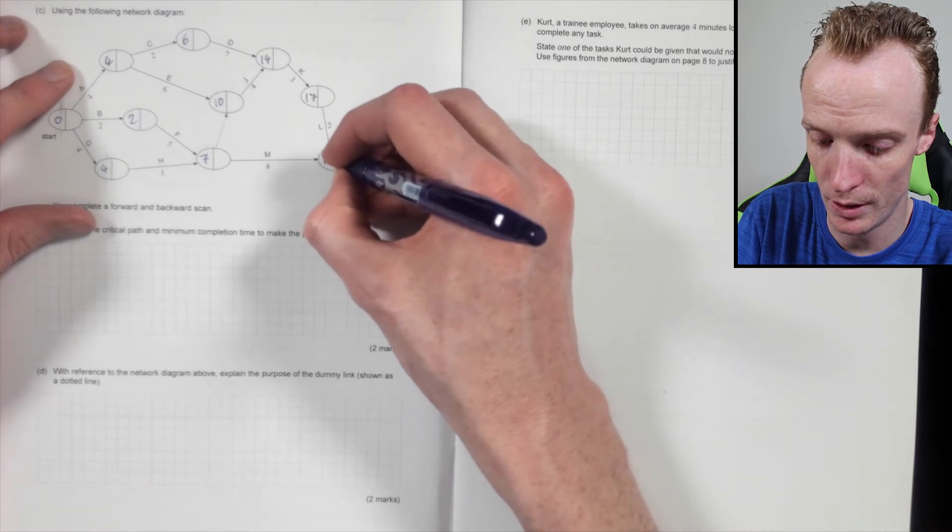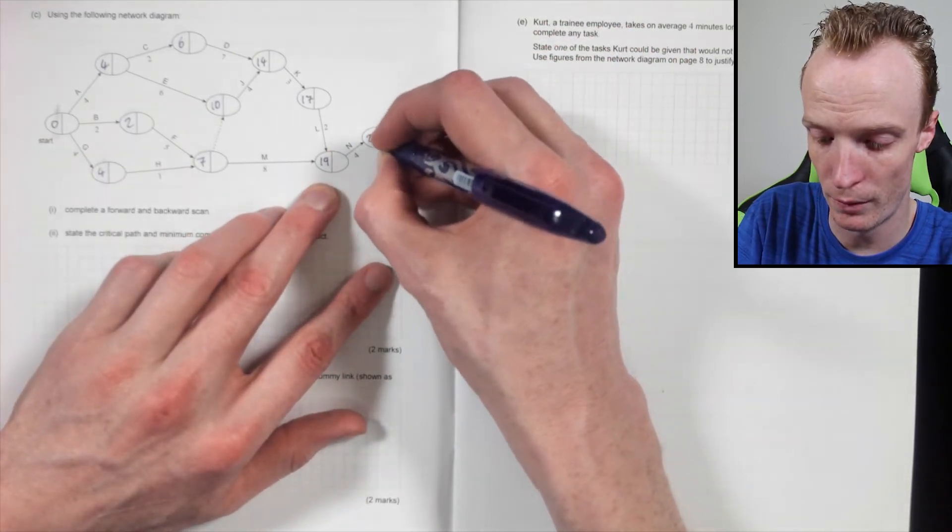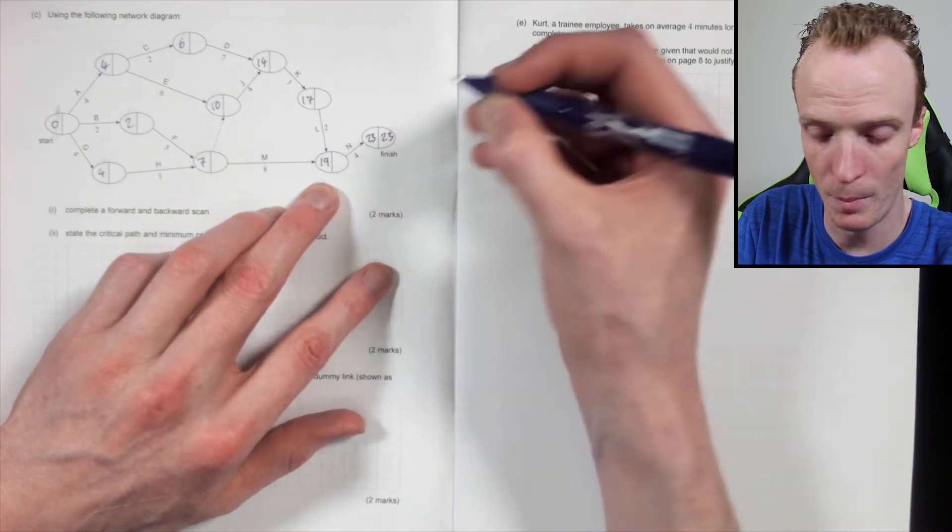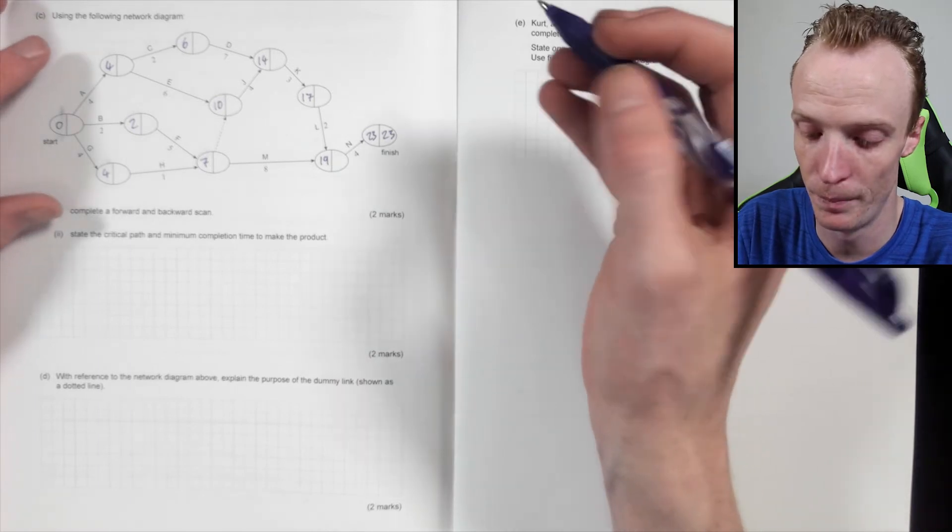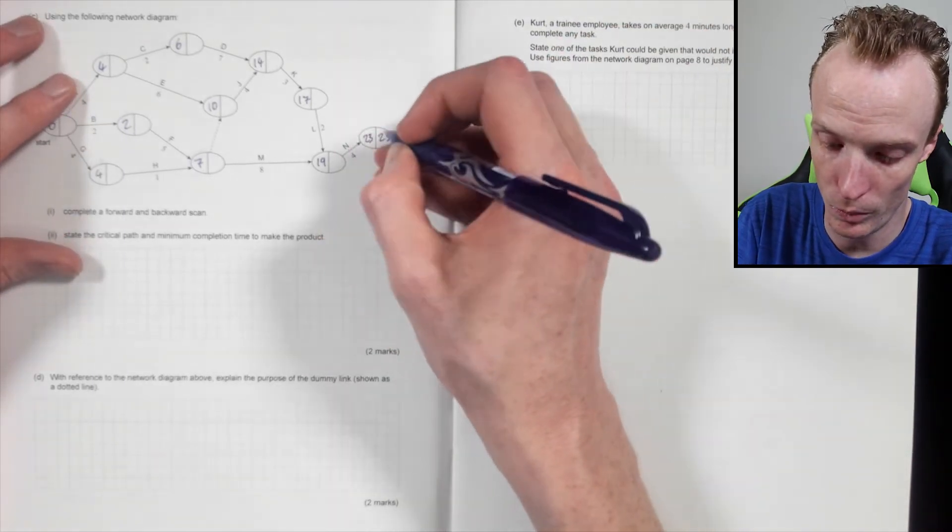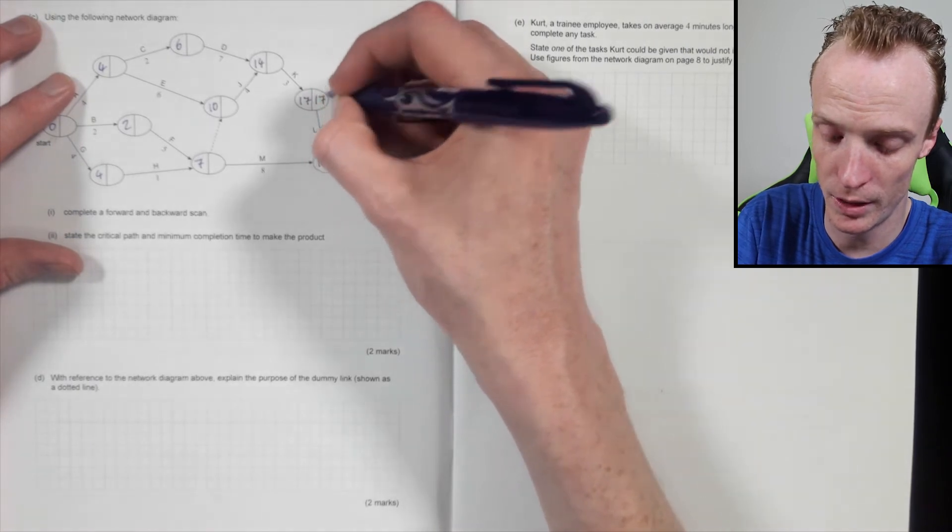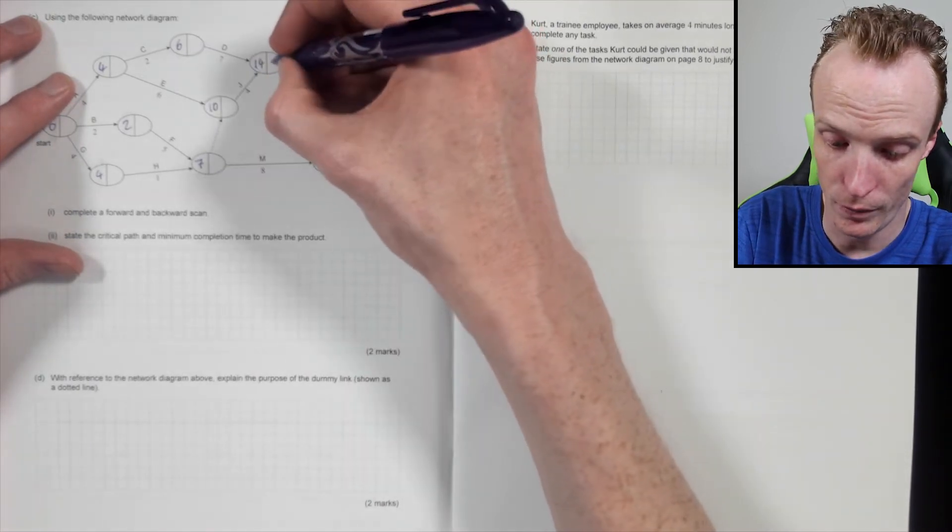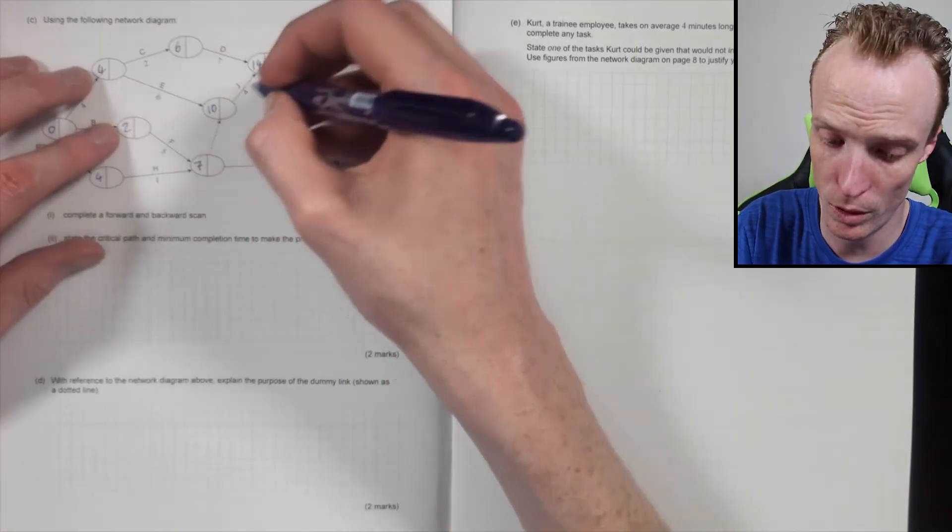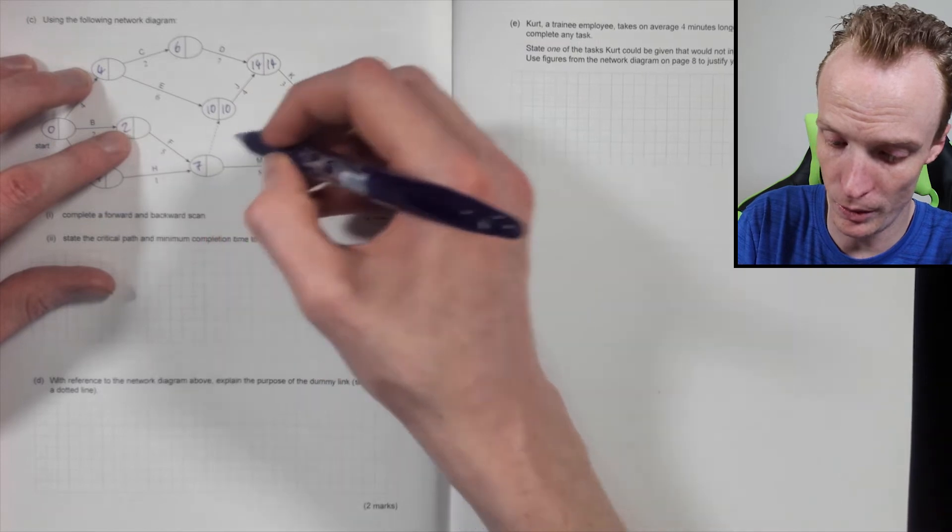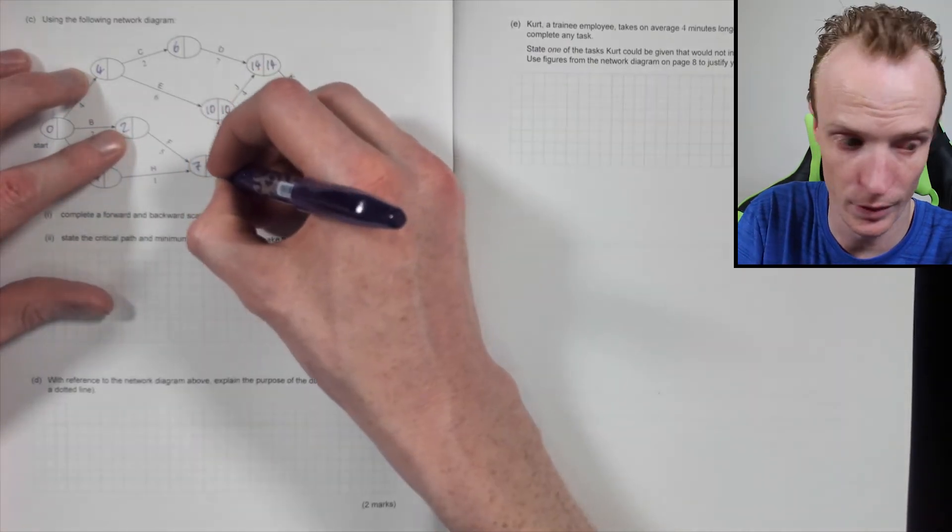6 + 7 is 13, 14, so that'll be 14. 14 + 3 is 17. 8 and 7 is 15. 17 + 2 is 19, and then 19 and 4 is 23. Now on the way back you've got to do the reverse, but you're taking the smallest number each time.